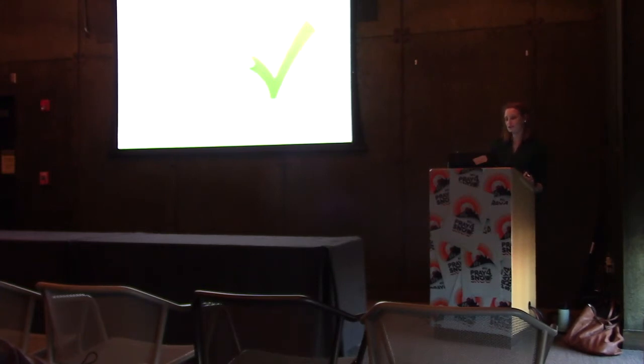Fees. Some of the agencies require fees. The DNR requires fees. Some watershed districts require fees. And generally, applications are not complete until the fees are paid. So keep that in mind and keep your client informed of that so that there's no delay between when you submit an application and when the fee finally gets paid.